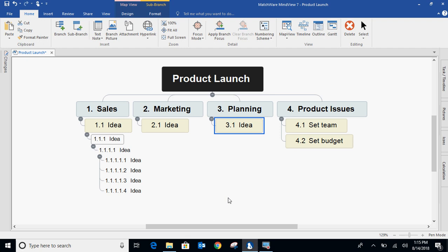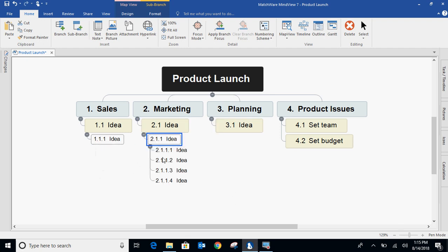This hierarchy plays a really important role when we export over to MS Project because this becomes a WBS numbering scheme. It also plays an important role when we export out to a WBS dictionary as well. And as I mentioned, everything's based on drag and drop. We can easily drag and drop this, and as I drag and drop it now, you can see that it also renumbers for me. So very easy to get started creating this WBS. Enter and insert and drag and drop.